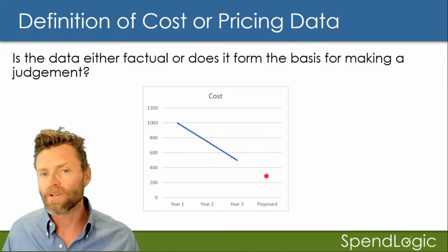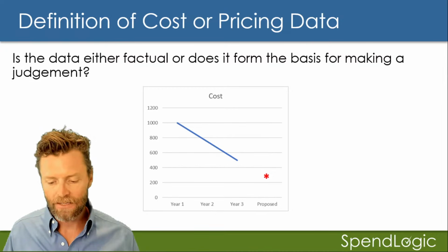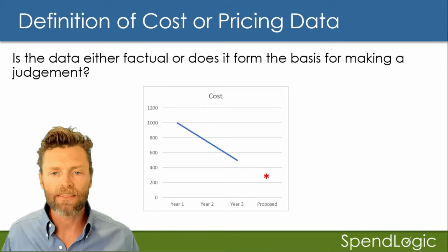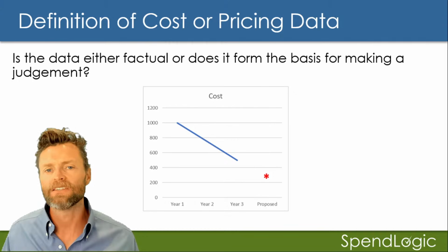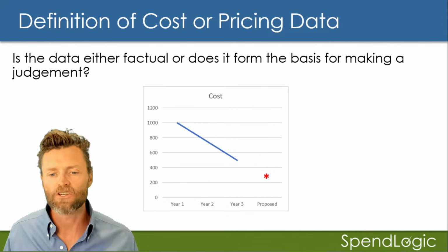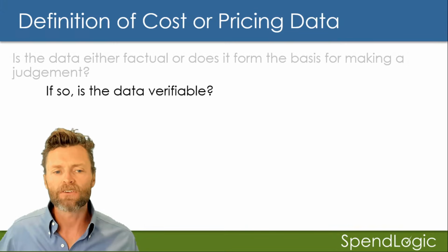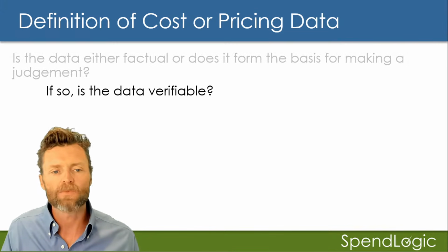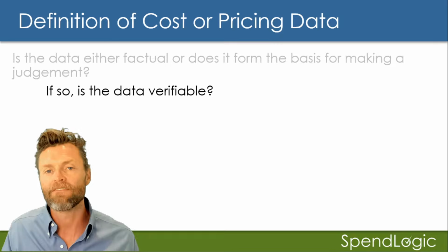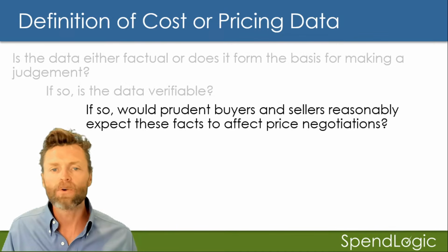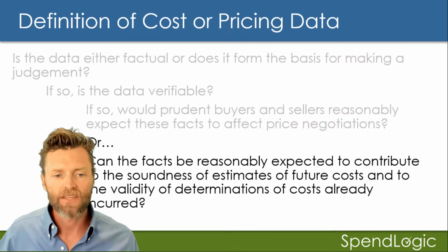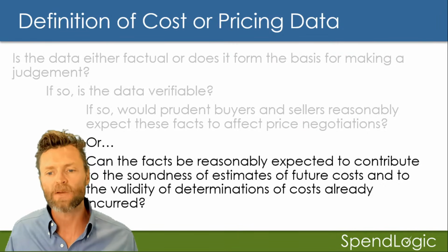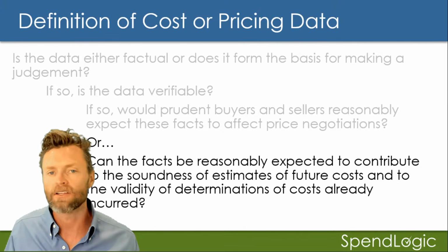So let's take one step further and look closer at the cost or pricing data. So what is certified cost or pricing data? The question to ask yourself is, is the data factual, or does it form the basis for making a judgment? Okay, let's dig further into it. If it is factual or makes a judgment, is the data verifiable? Yes or no? If so, would prudent buyers and sellers reasonably expect these facts to affect price negotiations? Or can the facts be reasonably expected to contribute to the soundness of estimates of future costs and the validity of determinations of costs already incurred?